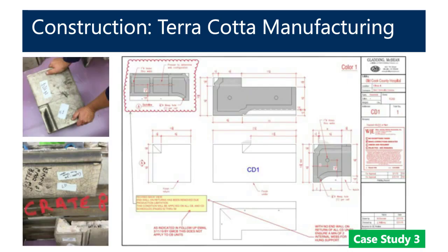And then moving forward into the actual piece documents or piece shop drawings, seeing how pictures could be shared, how the communication could be shared with the entire team very quickly, and moving the process of the documents from start to finish very quickly, and making a long lead time item, something like terracotta, as short as it could possibly be.